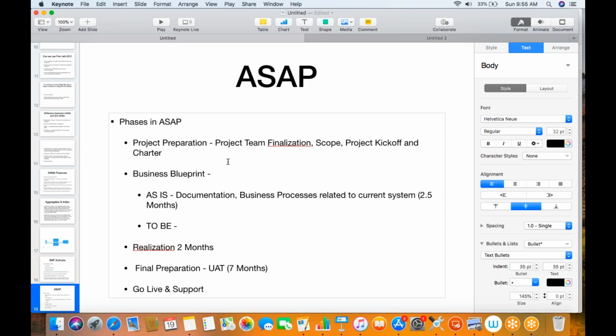Why not discuss everything by showing the system to them, making them understand how SAP works, the entire end-to-end process, and let them come and tell us whether it is fitting their requirement or not. So in SAP Activate, we are not going to waste our time in understanding their business process. Maybe sometimes, if the customer is not able to explain what he is expecting, what he is not able to achieve in SAP, for 1 or 2 scenarios, in order to understand it better, we can see it in the system.